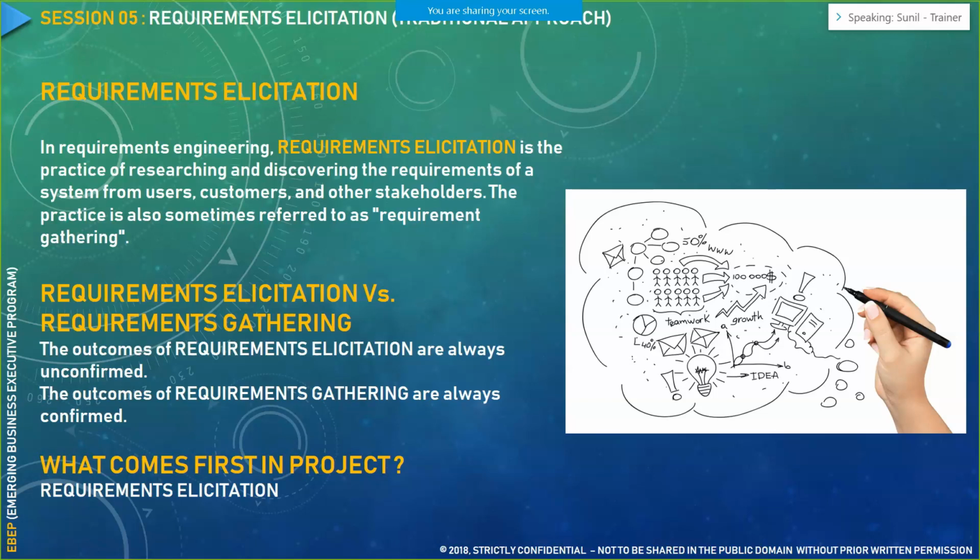if the nature of the project is very small, or 3 to 4 months if the nature of the project is complex. And this is the phase wherein we do constant interaction with the customer, as in the outsourcing company or the business, and try to understand what their actual need is. We do a need analysis, we write different business cases in that particular phase, and we explain to them what requirements we have understood from their needs. So these are the activities that you do.